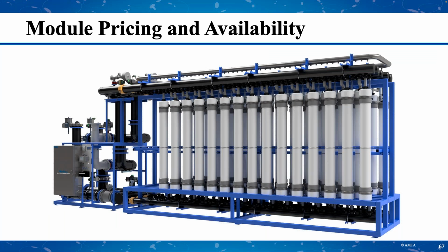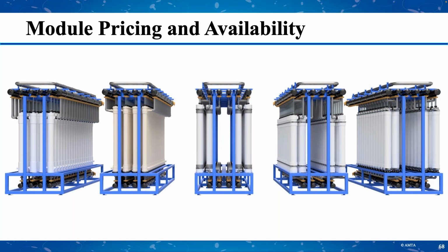Here's another example. This is a very custom engineered open platform system in California. This one was designed to support 6 different module brands. And there was a delay between submittal, the development of our designs, and submittal and approval of the submittal, and then when the contractor was selected and production started, installation started. So there was a 2 to 4 year delay in there.